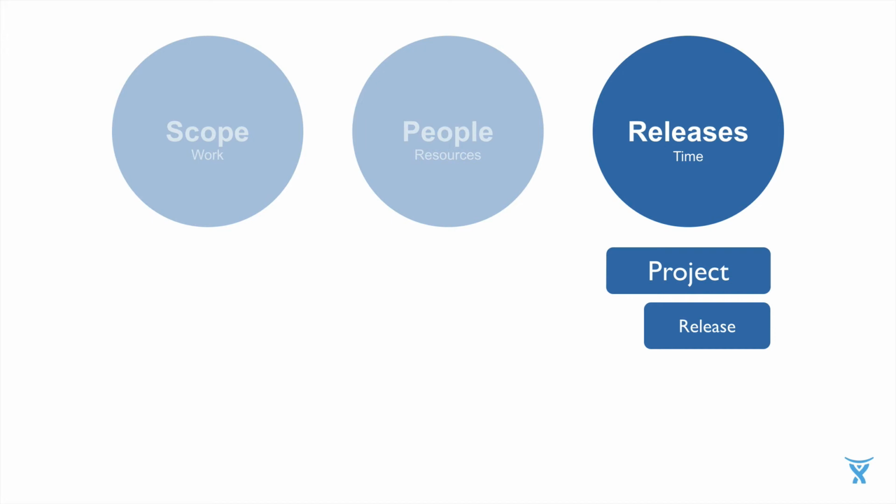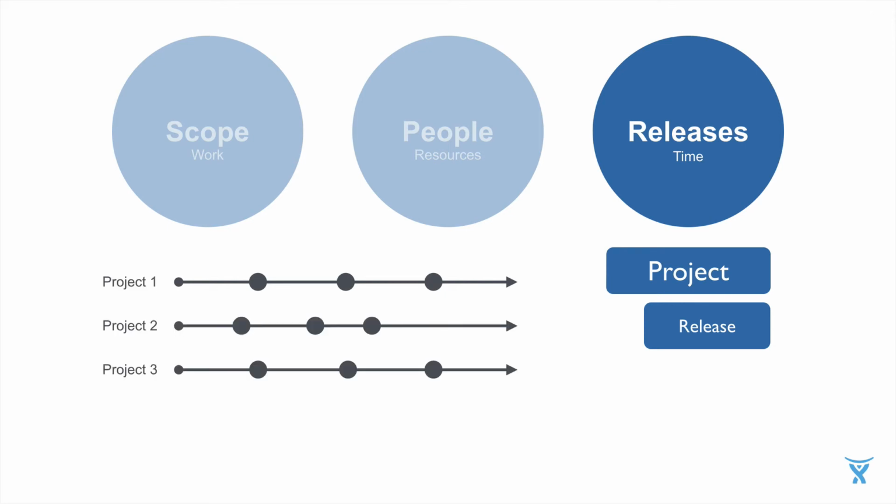Portfolio 2 also introduces an additional concept. So that's the basic concept of release, a timeline with release markers, and of course structured by projects. Portfolio also introduces now this explicit concept of cross-project releases. That's something that's new in Portfolio 2.0. And essentially what that is used for is to coordinate or align release dates across multiple projects.